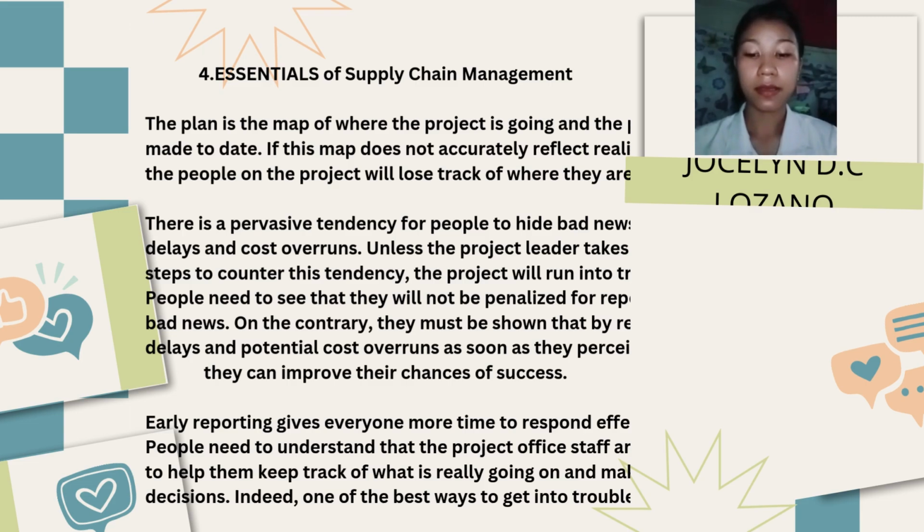There is a tendency for people to hide bad news such as delays and cost overruns. Unless the project leader takes active steps to counter this tendency, the project will turn into a trap. People need to see that they will not be penalized for reporting bad news.